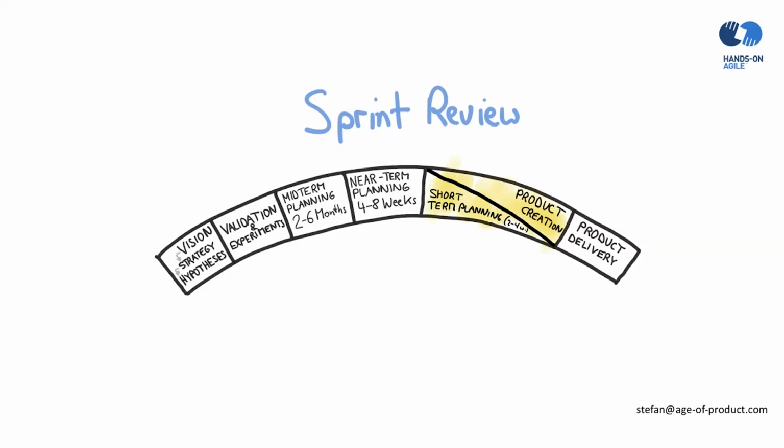This is the important thing. And I believe with regard to the importance of this, we also have a quite extensive idea within the Scrum Guide of how the sprint review is supposed to look. So it's the only event where you actually have some sort of checklist of what you're supposed to do to run this in the proper fashion. Attendees are invited by the product owner. So it's not an event the Scrum Master is supposed to facilitate or host. This is the task of the product owner.